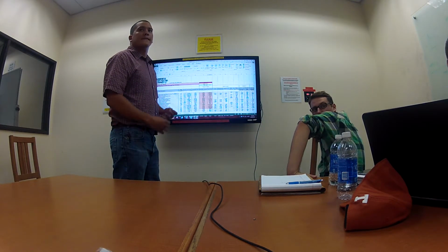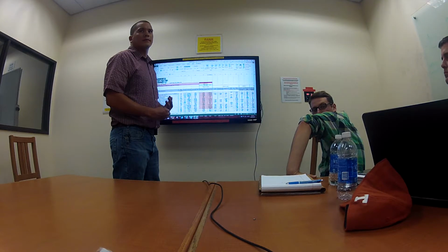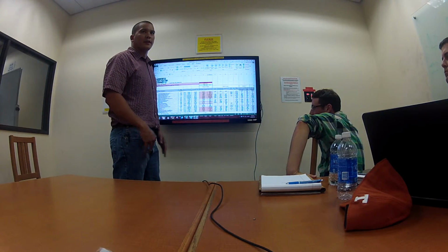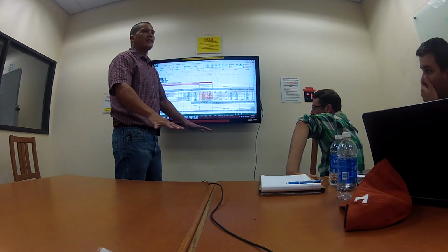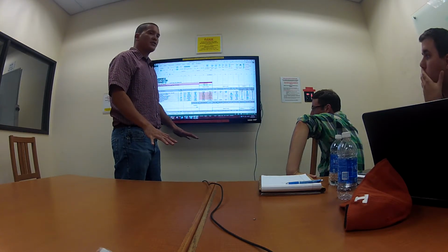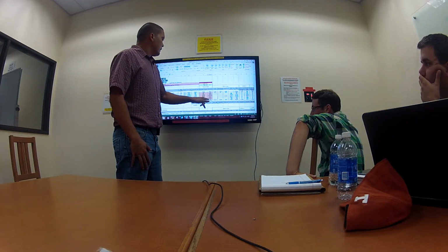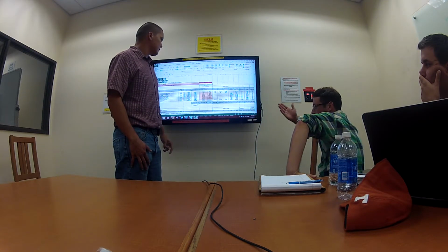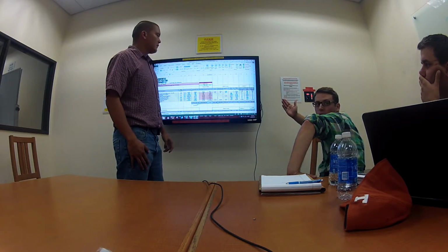Basically you're just trying to balance your extended and unit price so your bid total is where you want it to be, so that everything's covered, but you're spread in a more strategic manner. You're trying to get to your target extended price. You literally dump $600,000 on some items each time.